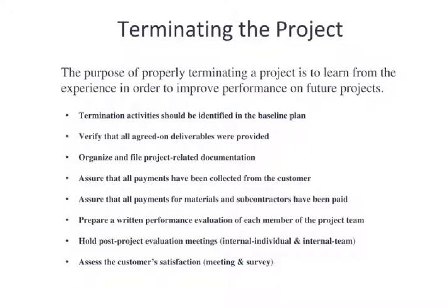However, when you're starting to work on larger projects that are spanning months, if not years, that have budgets going into the hundreds of thousands, if not millions of dollars, and you're dealing with lots of individuals, the book's technique to me is simply not rigorous enough. That's when moving to a more quantitative risk matrix approach is appropriate.